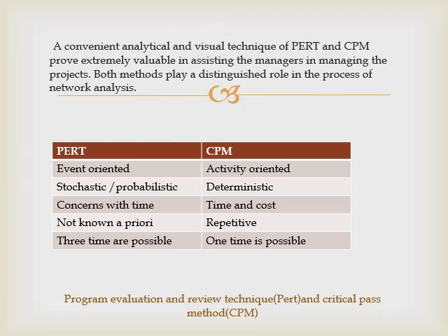PERT is an event-oriented network because in the analysis of the network, emphasis is given to the important stages of completion of a task rather than to the activities required to be performed to reach a particular event or task. That's why PERT is an event-oriented technique.